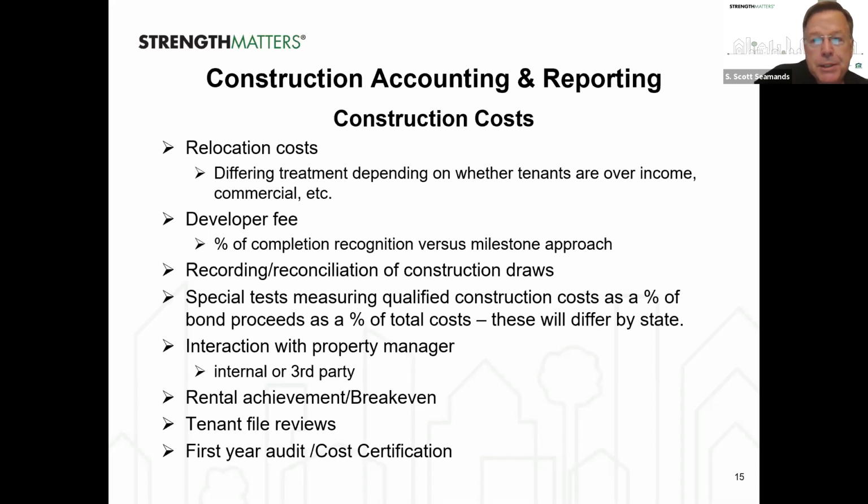And the reason for that is because the property has to be primarily funded with tax exempt financing. And that's interpreted to mean more than 50% funded by tax exempt financing, or else you don't get credits on the portion of the property that was not financed by the bonds. So that's an important rule to make sure that you're going to pass the 50% test by borrowing the bond proceeds in the same year that you're going to claim the credits, so that you can say that when you look at the total bond proceeds, you've maximized that, and it's at least more than 50% of the total building cost.